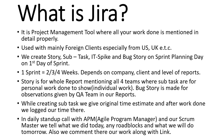There is also a business or client review — you make a separate subtask under that story and say you need one hour. Then you send the report to the QA team. With any observations your manager has given, you implement those, send back to QA team, and the QA team may come with some observations or bugs. They will create a bug story and assign it to you. You solve all the observations and bugs to make an error-free report, then log your time in that bug story.